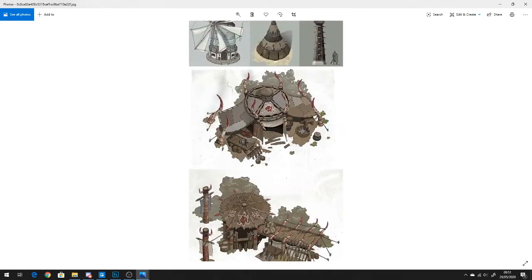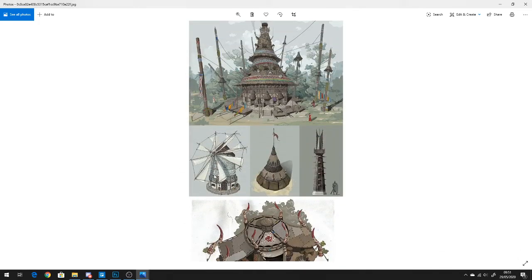state, okay, in order for me to finish this, I need to have this. One will take, from building a 3D model, I'll go build this based on the concept given. I need a model sheet, which is already given. Okay, that's cool. In order for me to do this, I need to do the process of block out. After blocking out, I need to create textures, or I have to paint textures, or